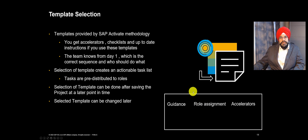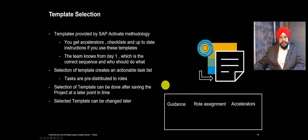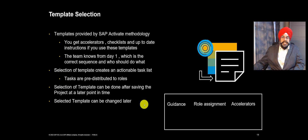If you are not sure which template to select, you can defer this, save the project, and come back to template selection even later. If you have selected the wrong template, no problem — you can easily change the template, but the tasks from the previous template will be set to obsolete.